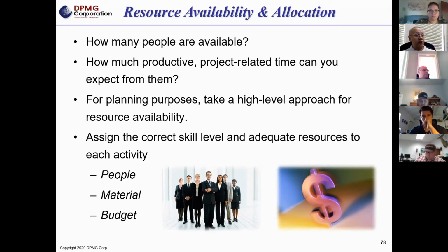We have to look at the task, and we have to look at what skills are required to perform the task, because that should define the who. Right? The skills required to perform the task should define the who, which in turn is going to define how much time they're going to spend.